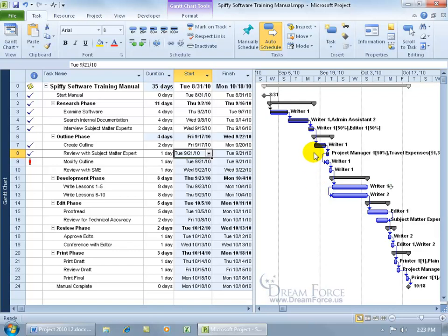Because when you're dealing with actuals here and you update them, it just moves that task and it doesn't affect the other ones if its successor has been completed as well. But if, again, the successors have not been completed, then you see when I adjusted this one and pushed it out, everything else, like a domino effect, gets pushed out.